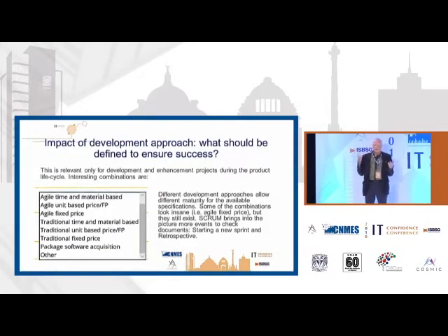So nowadays, majority of the projects are agile in Finland. They are probably agile in Brazil as well, and in many other countries, in Mexico. And then the pricing system, how do you pay? We heard presentations yesterday, there are fixed price contracts, there are time and material based contracts, and there are also unit price per function point contracts.